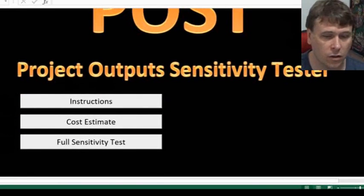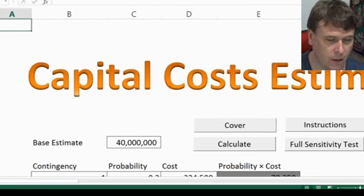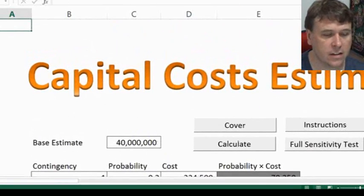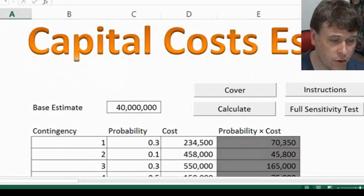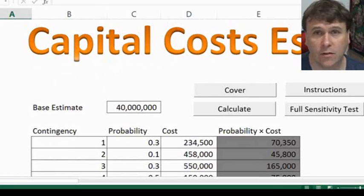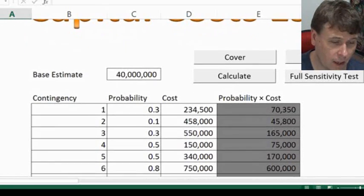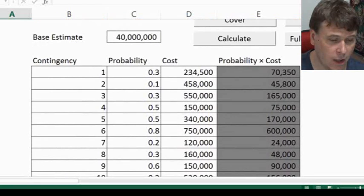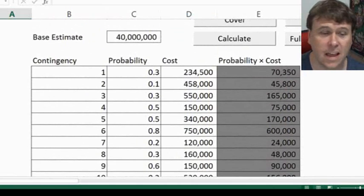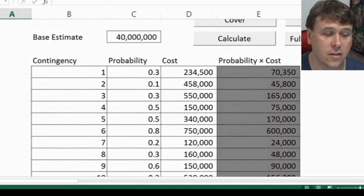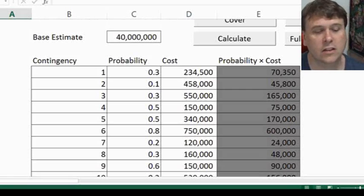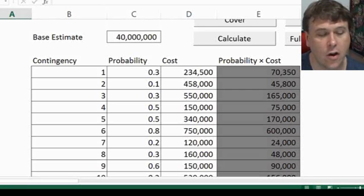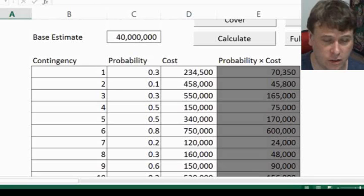So let's go to our cost estimate first. As you can see, I've entered some numbers in here. We've got a base estimate of 40 million, and I've also got contingencies as well. I haven't put the names of contingencies in there, but I've listed them from 1 to 10, as well as assigned probabilities to those contingencies, which can be used to calculate your costs.